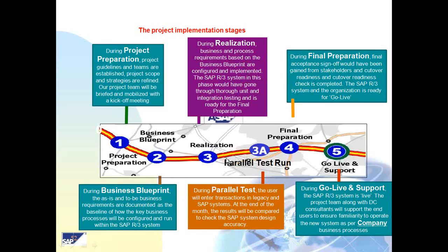Okay. So between realization and final preparation, there is parallel testing. Normally the user will enter the transaction in the legacy system, and of course in the SAP system, and at the end of the month the results will be compared, checking the SAP system and determining the accuracy.